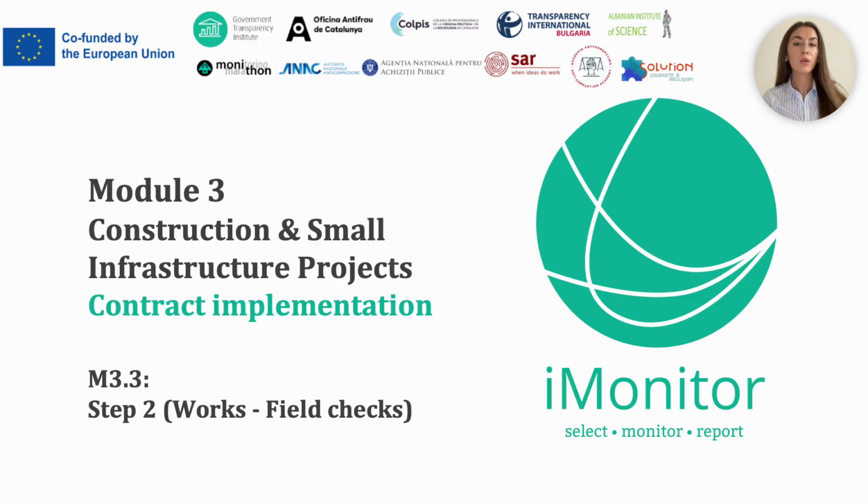Corruption scheme 1 can mostly be spotted on the ground when we check whether the extra money, time or works that were added on paper cannot actually be seen and justified on site. Whereas corruption scheme 2 is usually spotted when we compare quantities, quality and payments. And lastly, corruption scheme 3 is generally spotted when we look at which company names actually appear or not on site. There's also one cross-cutting risk factor behind all of these corruption schemes: obstructed or controlled access to the site.